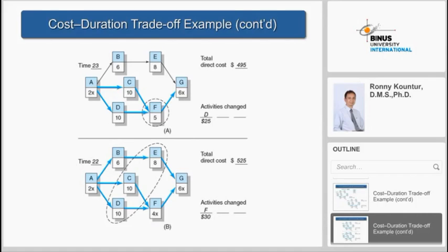However, you notice that when activity D becomes 10, the critical path changes, so there is an additional critical path. See the next picture. All paths become critical when D equals 10.